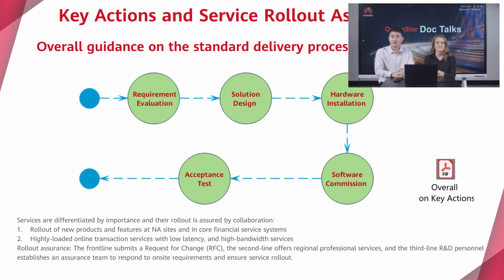For the delivery quality check, use the SmartKit deployment quality inspection tool to perform an inspection of the storage hardware status, the software status, value-added features, storage configuration, and alarms. Ensure that all items pass the inspection so as to prevent maintenance phase problems arising from incorrect storage configuration or not using the recommended version. Upload the inspection result report to the e-service platform for archiving by choosing Inventory Management, Upload Archives.